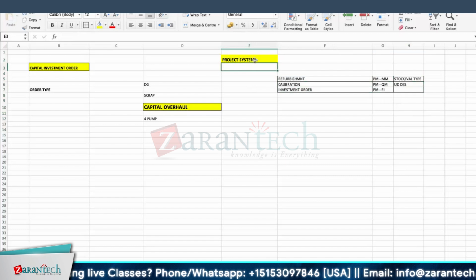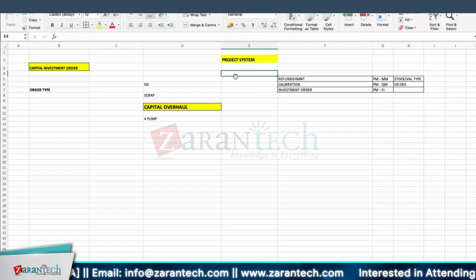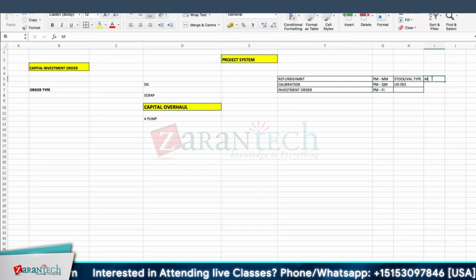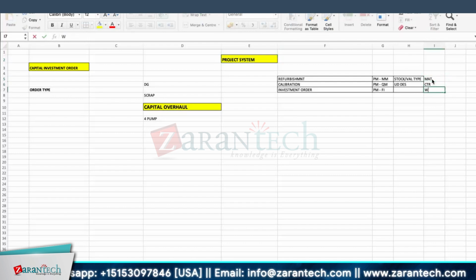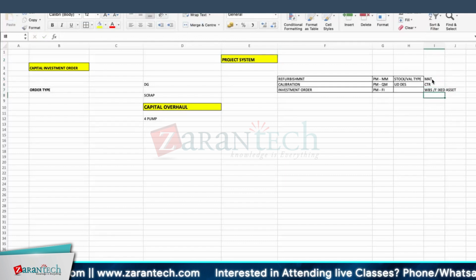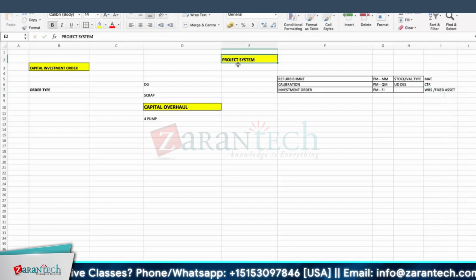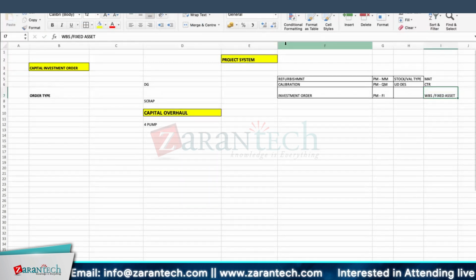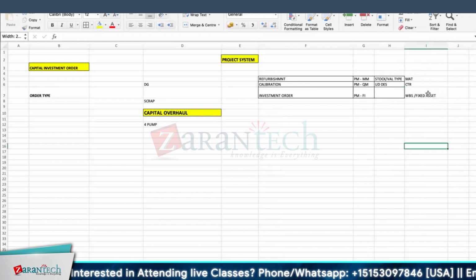No, that's why I said when you go major, you go for project systems, and here we are using it partially. As you asked, from where will the budget flow? Normally in other cases, we'll settle to material. Calibration by default goes to cost center or something. Here majority will go to a WBS element, or there is something called fixed asset. If you are going for a WBS element, obviously a PS person will create it in the PS module. Fixed asset is also possible, against an existing fixed asset.